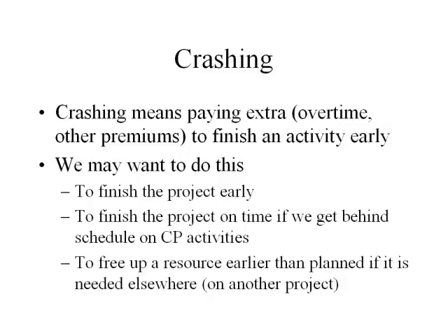If we want to finish the project early, in other words, then we're going to need to expedite an activity that's on the critical path, maybe more than one activity on the critical path. Or sometimes we might get behind and we have to expedite another activity in order to get caught up. Sometimes we might even need to expedite an activity that's not a critical activity.